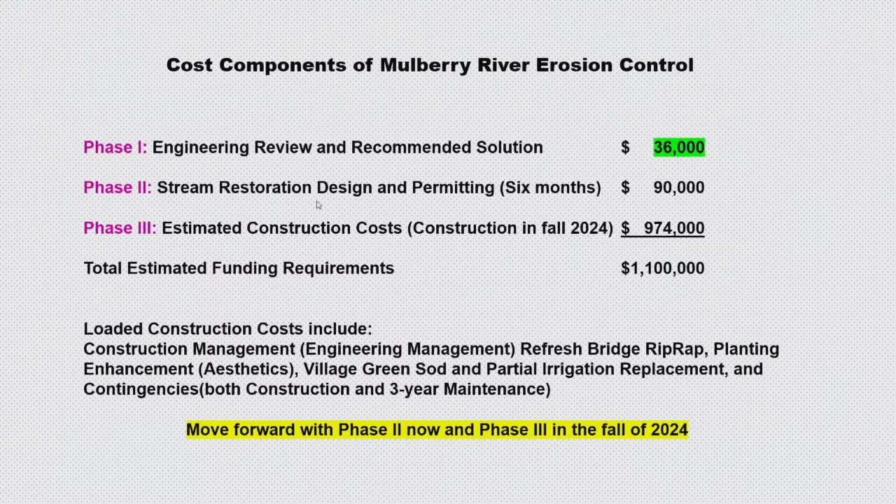When you look at the loaded cost, if you look down at the bottom here, construction management is about $60,000. And we're going to have somebody manage this, put together the bids, send them out, bring them back, oversee the project. We're a bunch of retirees and we don't have the expertise to do that kind of thing, but it's readily available. Use the same construction manager that town of Brazelton used, and they were very happy with them.